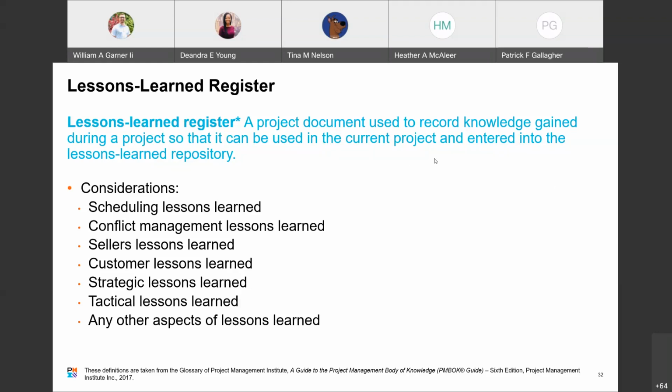I think the important thing here is whenever I look at lessons learned, and I have a habit of doing this as well, it's important to note the stuff that they're calling improvement opportunities or developmental areas. But it's also a good idea to improve what went well, right? I've got examples where, by creating a very certain template or something that simplified someone's work, I was able to reduce their standard SLA, their cycle time, by 50%, just by saving them some time from having to look everywhere.